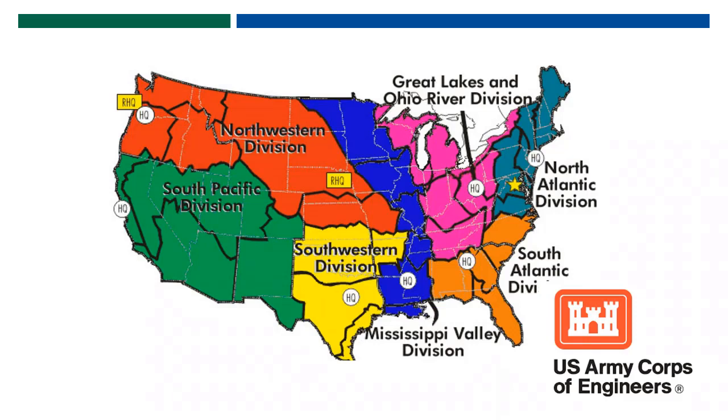We do take pains throughout our project development process, starting from the A3M and going all the way through FFPR to continue to tweak this. Now, if we tweak things at FFPR, as you all know, that can be after lockdown plans, for those of you familiar with the PDP. And if we get there, we can wind up having to redo a permit that we already applied for. So there are some rework examples that might come up if we discover too late that we're going to change or especially increase impacts from a given project.